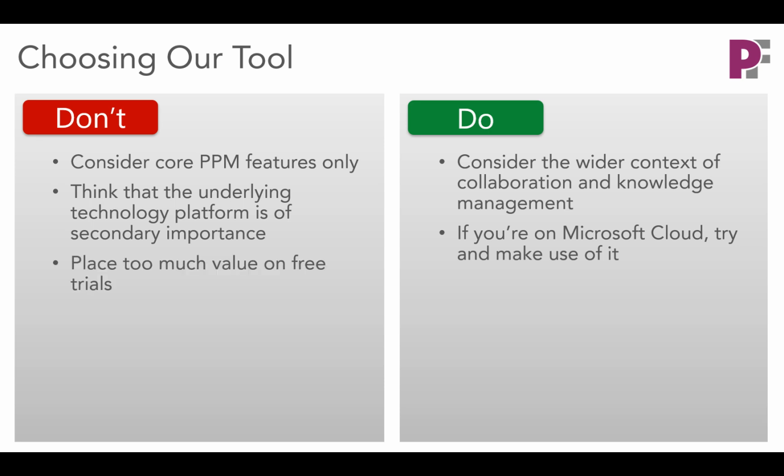One other point though: don't place too much value on free trials. Obviously, a lot of cloud vendors freely offer trials, but really they are likely to only give you a very superficial experience of the tool. It may be a better idea to down select to maybe 2 potential suppliers and then pay them some money and get a paid-for prototype up and running that's already somewhat customized. Maybe some of your real data is imported into it, and engage much deeper with that solution in that way, which provides a higher level of assurance that the tool is right for you when you come to select it.